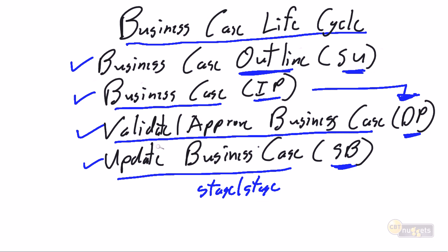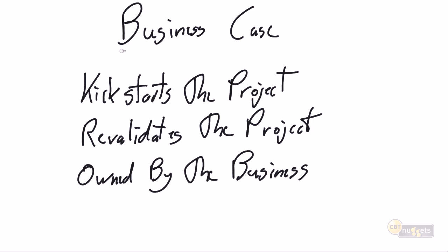And that's a key distinction that Prince2 really calls forward, is the business case is not a one-time upfront statement to get the project approved. The business case lives throughout the entire project lifecycle and must be maintained through the entire project lifecycle. And that concludes our discussion on the business case.